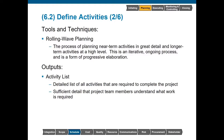Outputs from this process include the activity list. This is going to be a detailed list of all the activities that we must do to complete this project. All we're trying to do is figure out all of the activities. Later on, we'll go ahead and put them into the right sequence, figure out how long they'll take, and then actually build a schedule. We just need a list right now. Within this list, it should be sufficiently detailed so that a team member can understand what work is required.